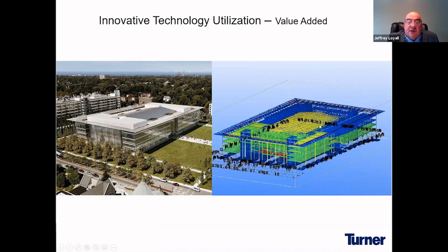The areas in blue had yet to be drawn and approved. So essentially, what you wanted was the fabricator on the same page as the structural engineer before any steel was made in the shop and sent out to the field for installation. And the area highlighted in red was on hold pending redesign.